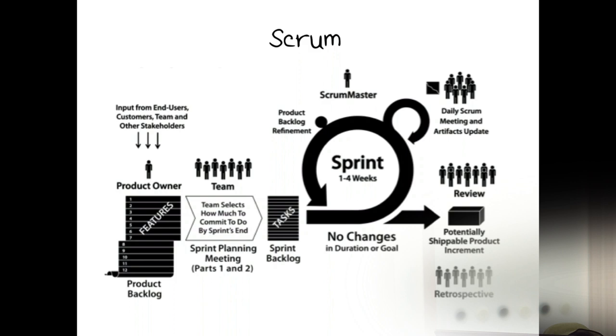At the end of the sprint, there's a review, which Lasse talked about before, where the team presents what they have done to the product owner. Product owner is the customer kind of for the team. As they present what they've done, the product owner says, that looks good. We can roll this one out. So we can ship this one, incorporate that into however we're releasing things. Or the product owner might say, now that I see it, I think we really need to modify this a little bit. So put this feature back on the backlog with the appropriate modifications that the product owner wants. Does this make kind of sense?